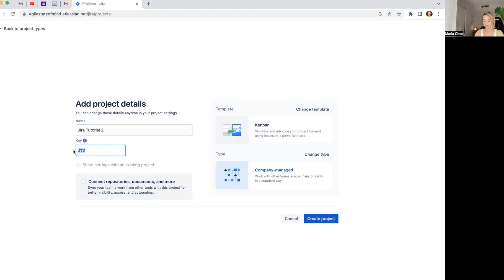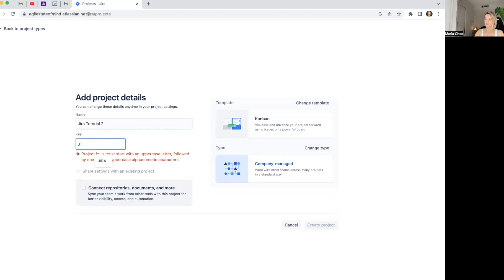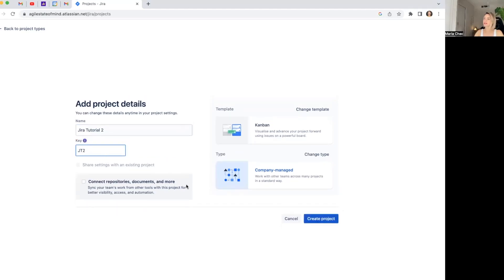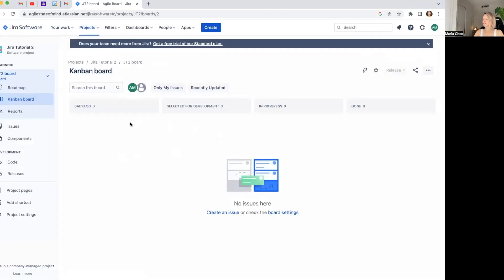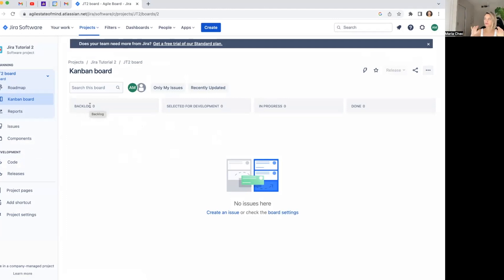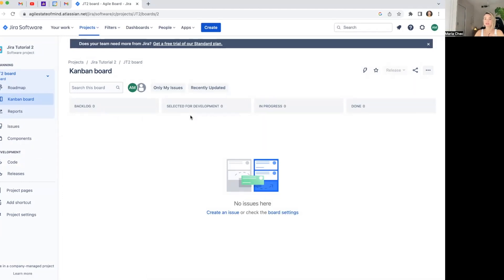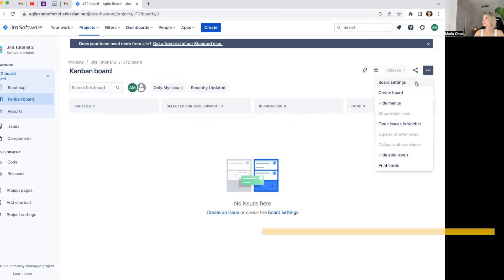You know that the key, you can put whatever you like. This one I already took, so I will just use the one they suggest. I actually like that. You can change it and create project. So there we go. The project is there. And as you see, if we create directly a Kanban board, they will create, they improved. So we don't only have to do in progress done, we have like a real Kanban. So we have a backlog, we have selected for development, so the ones that we refine and are ready to go, and this is when the counter starts. In progress and done. Done is when the counter ends.